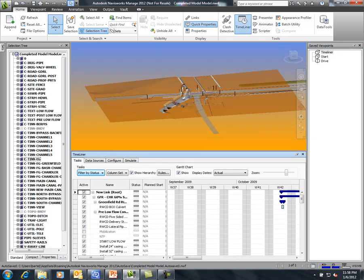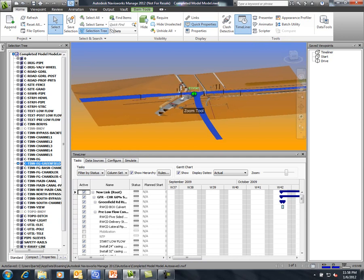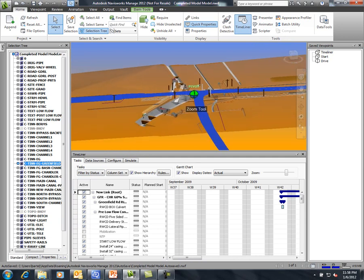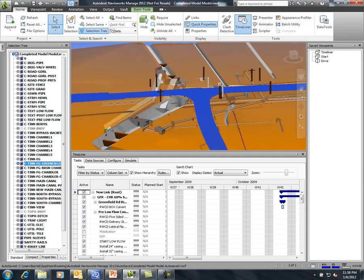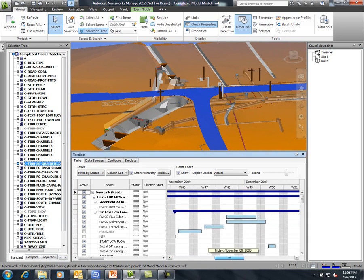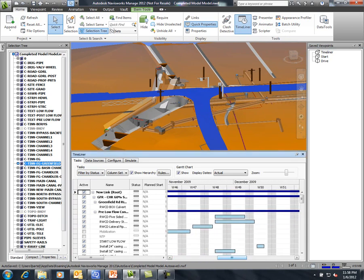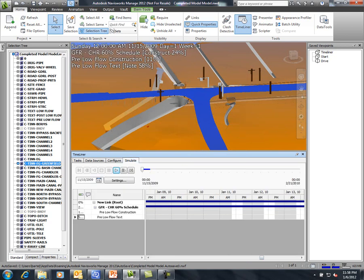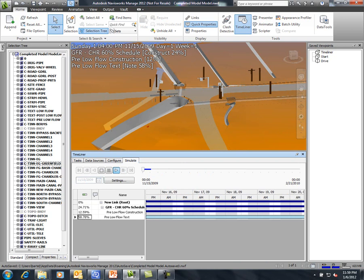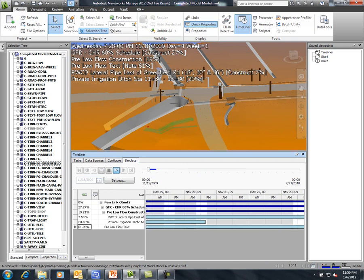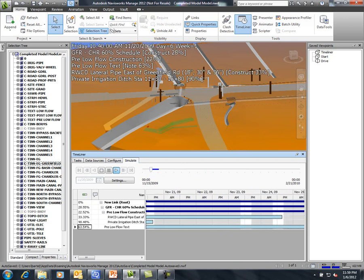Finally, we can synchronize all of the project schedules with the completed model to visualize the construction sequencing. Whether the project schedule is Primavera, Microsoft Project, or a simple spreadsheet, model components can be assigned to the schedule such that all affected parties understand the construction process and the impact it will have on them specifically.